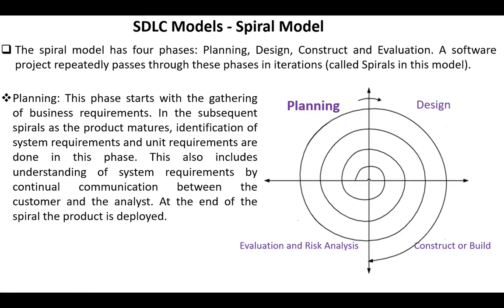The planning phase starts with the gathering of business requirements. In the subsequent spirals, as the product matures, identification of system requirements and unit requirements are done in this phase. This also includes understanding of system requirements by continual communication between the customer and the analyst. At the end of the spiral, the product is deployed.